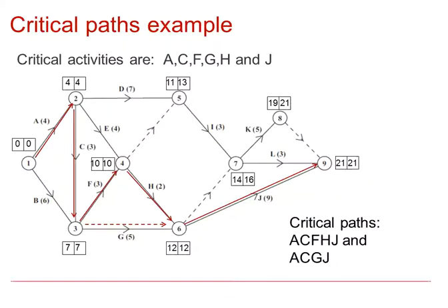Thus we have a number of critical activities, and then also we have more than one critical path, as marked on the diagram. So the option you can see is that A, C, F, H, J are critical, you could also have a path A, C, G, J as well, as shown by the dotted line.